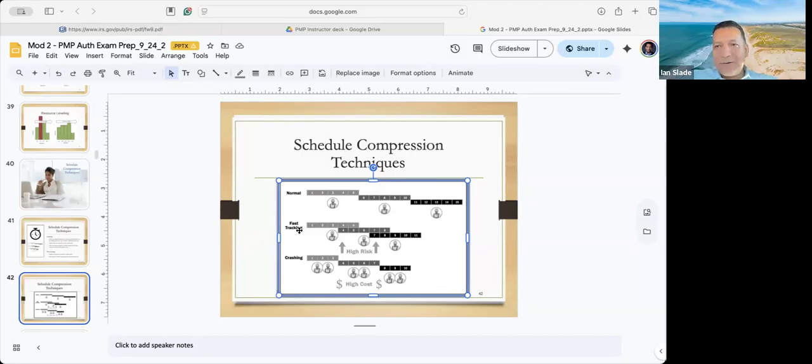But the team that you have, let's say Alicia is in charge of build, you now have Alicia starting to work on the build, right? On Thursday, with what we've gathered Monday through Wednesday. And then we're hoping that whatever is said on Thursday, Friday from the requirements gathering does not contradict what Alicia is starting to build. So fast tracking is very risky because you're building before you know all the requirements.